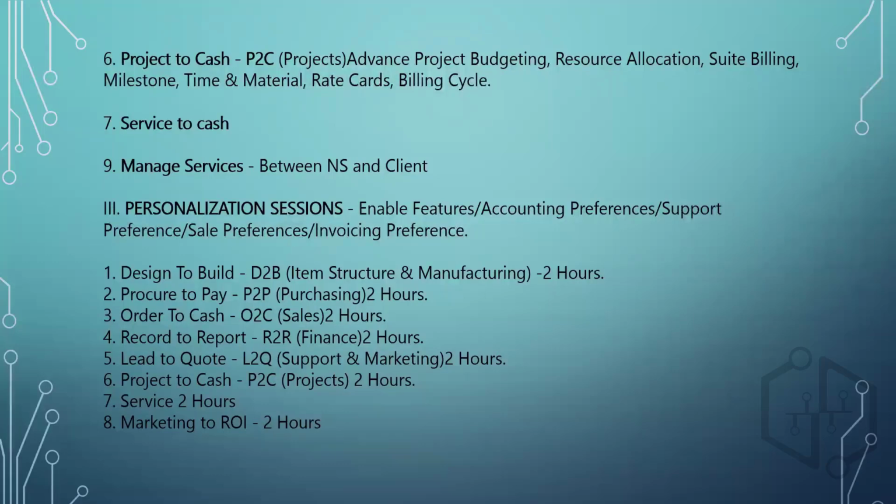So the rate cards, how they work is, there are different bands for the consultants, as I told earlier. There is a solution architect, a senior solution architect, a technical developer, a functional analyst, a senior functional analyst. So the billing rate cards are defined based on the roles that they perform. It doesn't matter who is working on them; all it matters is what role this person has. Based on the role, the rate gets picked up automatically from NetSuite.